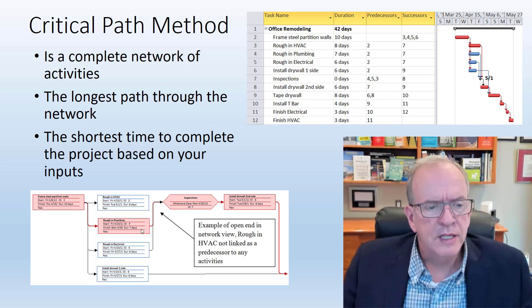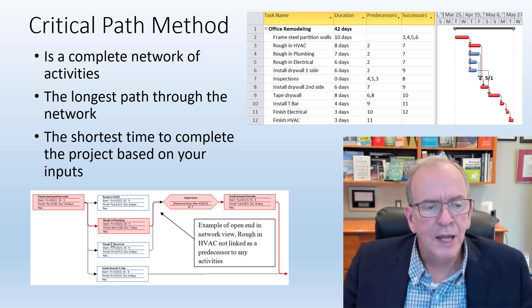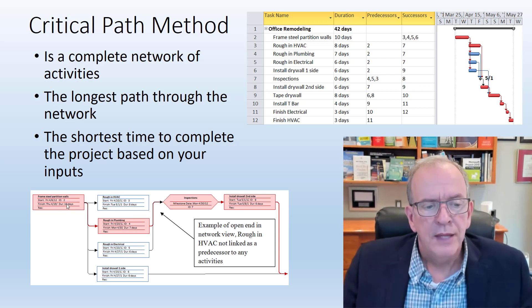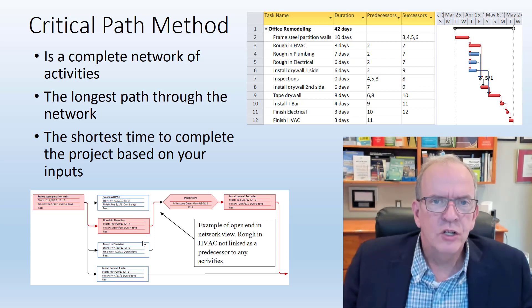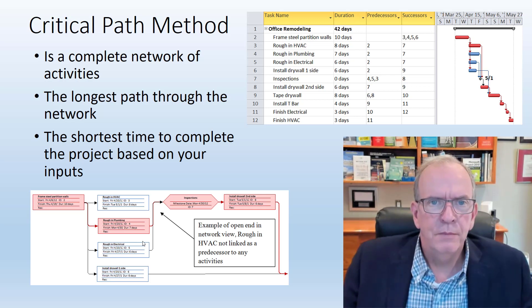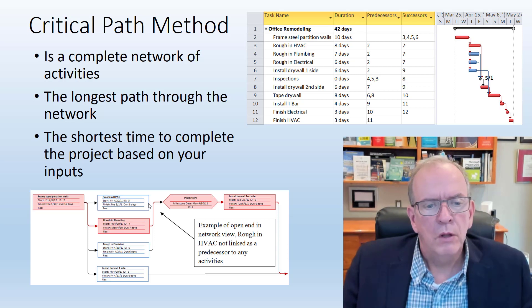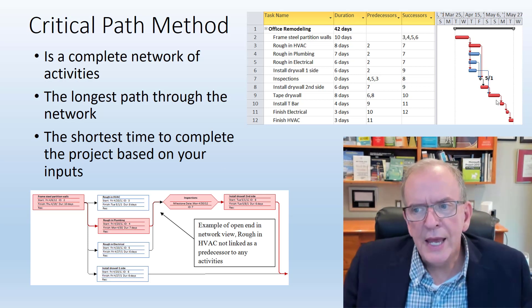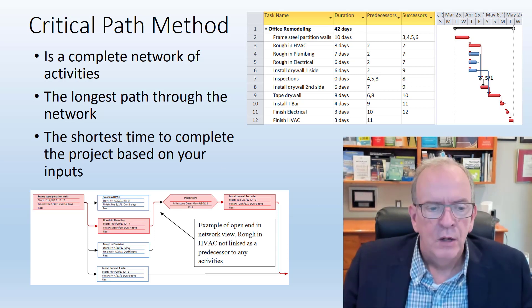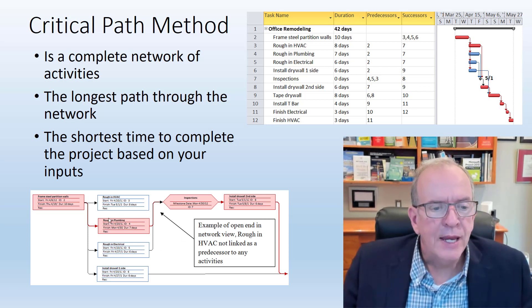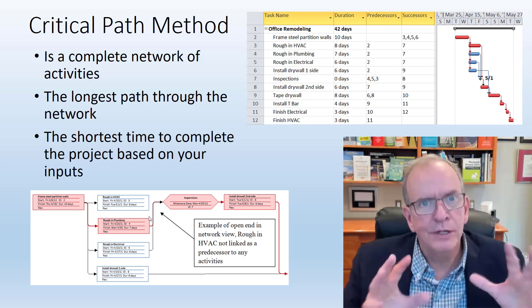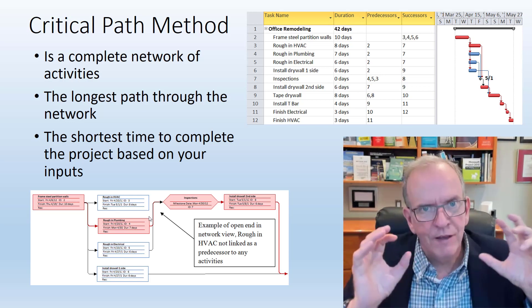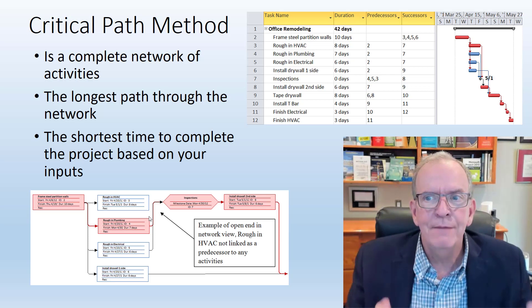You can see in this example here, when I say a network diagram, the bottom left corner here of your screen, that's a network diagram. So any kind of scheduling software like Primavera P6, Microsoft Project, when you create this Gantt chart, will be creating this network diagram. The network diagram is actually the founding of where critical path came from.